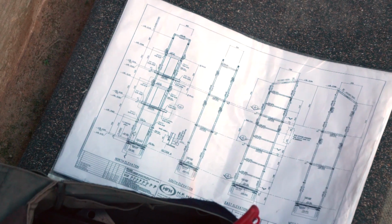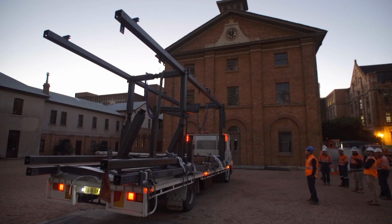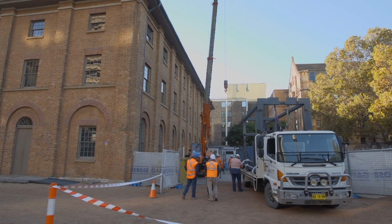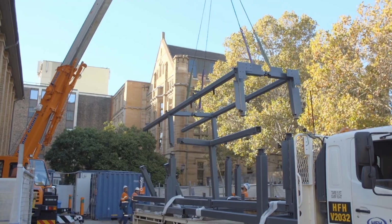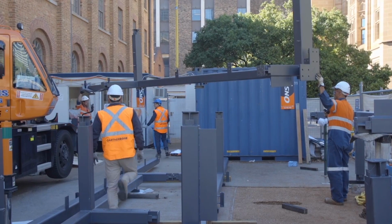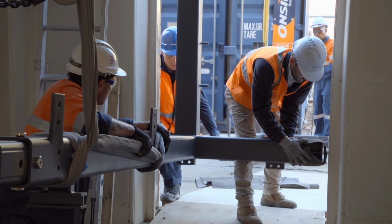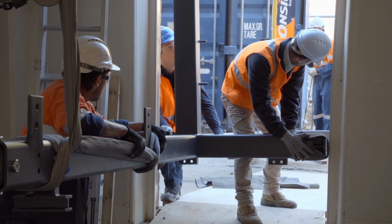From start to finish, designing and installing the lift has probably taken us about 2.5 years. The more challenging aspect was how to build it and install it inside the building without partly dismantling the building. And in fact, all of the lift components came through one side door on the south side of the building, which is probably 1.6 metres wide and normal door head height, 2.1 metres.